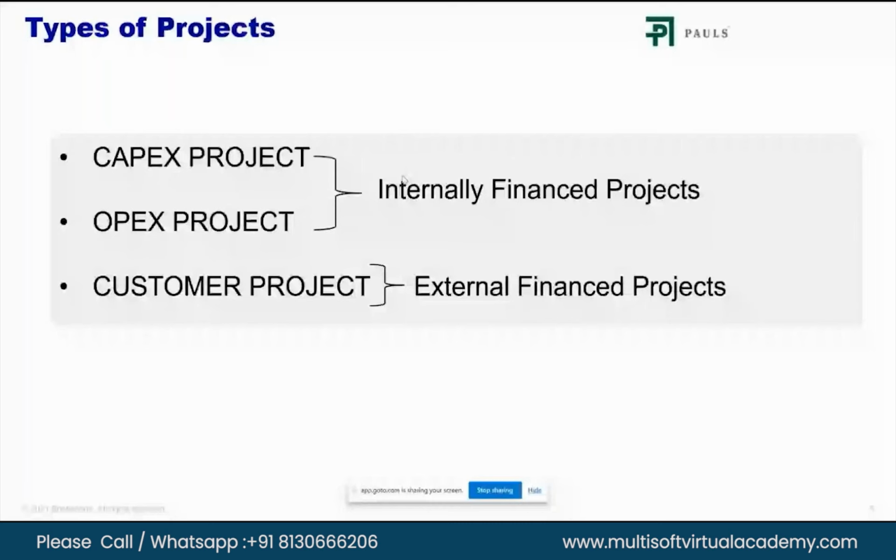Whatever defect is found in the expressway, say a crack in the road or any mishap on any part of the road, has to be taken care of by the contractor who constructed it, within his scope to cover all the liabilities. We call all the work done by the contractor in the OPEX stage the defect liability period, in which he has to look after all the operation and maintenance part of it.